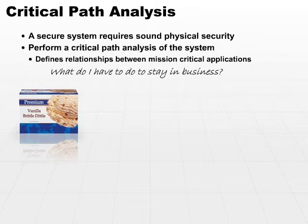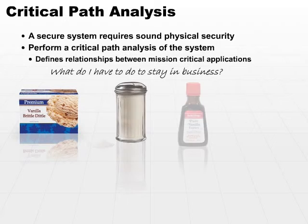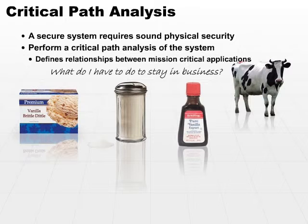What happened before that? We did something else. And at some point, we are going to get all the way back through the process until we end up with — hopefully nothing more than — sugar, milk, and one or two other things we can pronounce. The idea is that we figure out exactly what process it takes to produce our ice cream, and then we decide how each function is interrelated. And that is our critical path.